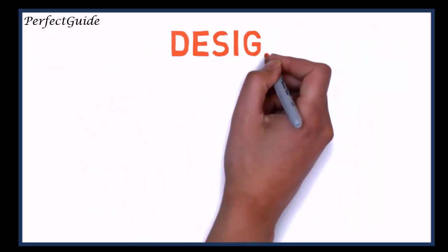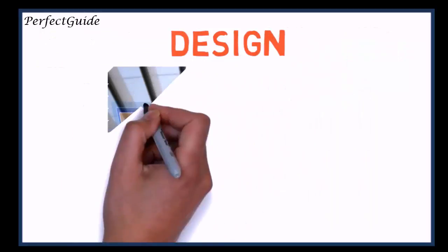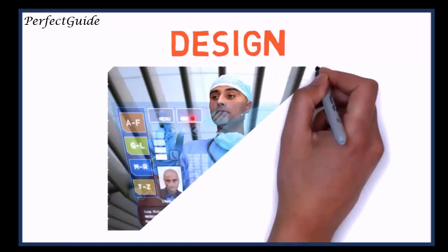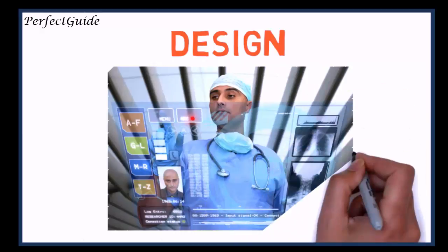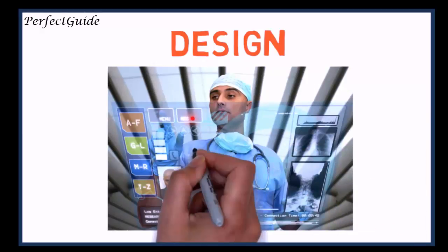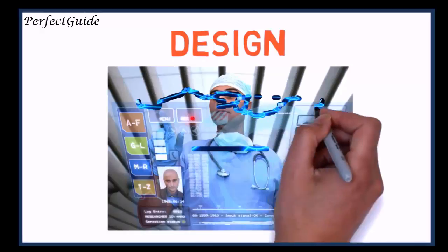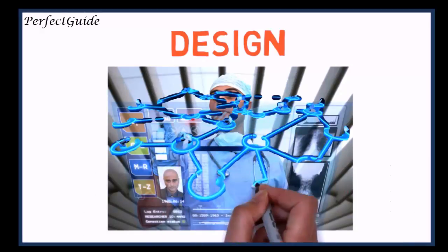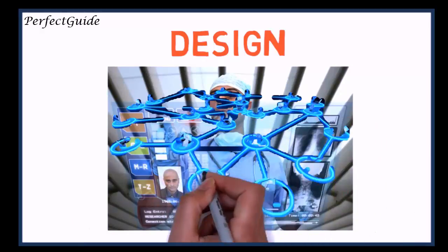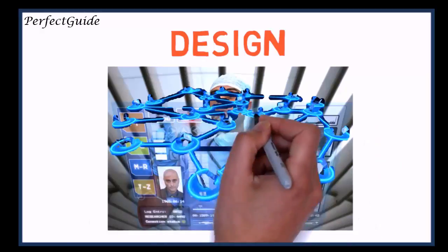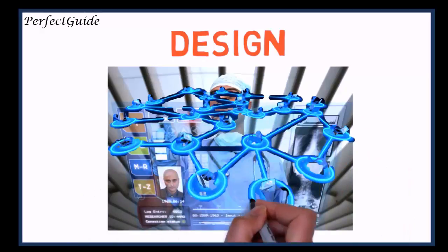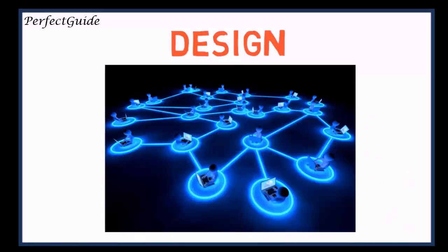The design phase translates the detailed current state requirements into the future state, outlining how the EHR system will integrate into future state workflow requirements. A key component of this phase is developing detailed process maps for key future state workflows. The design phase is one of the most critical phases for successful implementation of the EHR system.